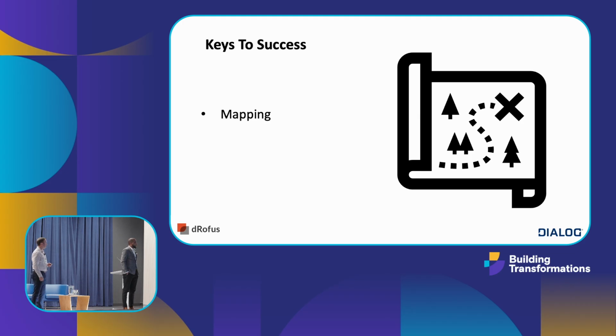So if you just think about that and we take the component of a room, that room has an ID in dRofus, which allows it to be connected to a room in Revit, and that ID is maintained. That ID is present when we use Excel to import information, like for example, what equipment is going into a particular room. And that ID is also then used to make that connection to Matterport in terms of the hyperlink. So that's from a data perspective, having that mapping.